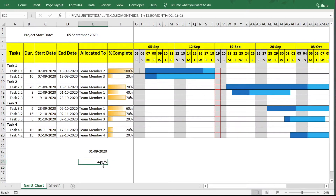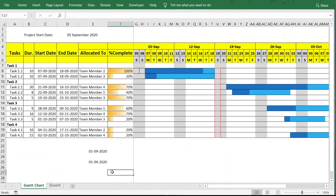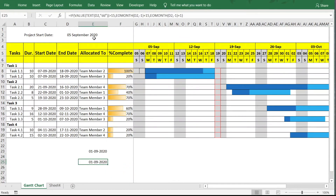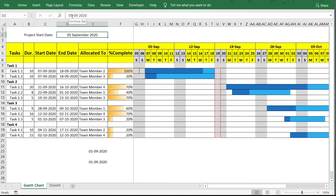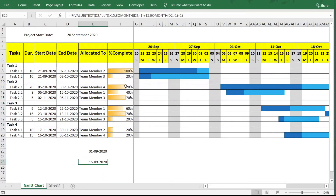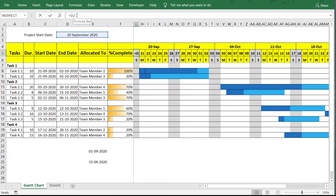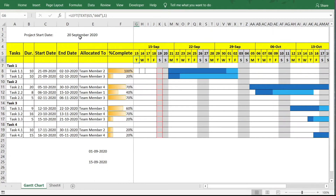This formula is working correctly. We can now copy it and use it as the first date in our timeline — replacing the previous static reference in cell G5. So if the start date is 20th September, the timeline starts from the 15th; if we change it back to the 5th, the timeline shifts to the 1st of September.